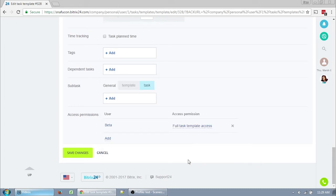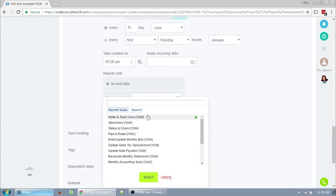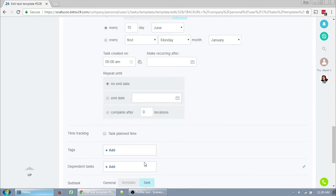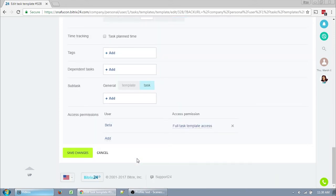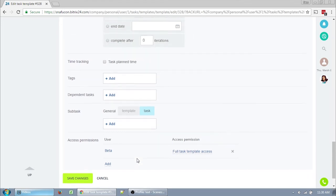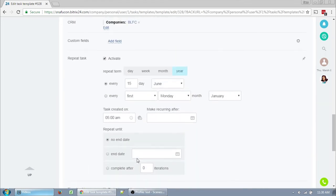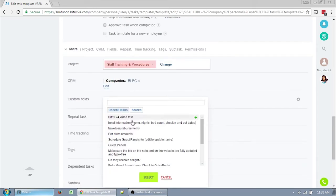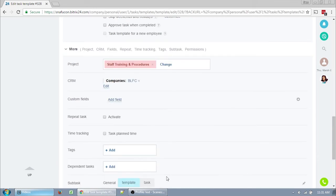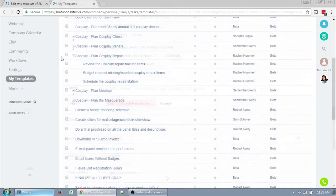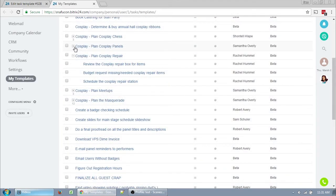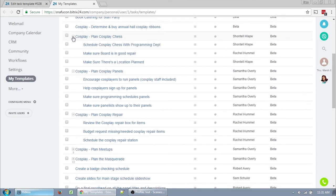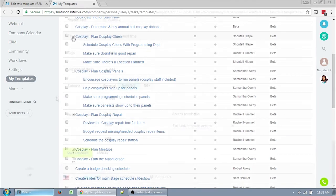Next we have subtask. Subtask is actually short for subtask of, which means this template is a subtask of another template or task. Notice that task is already highlighted, and I can't click on template. I strongly do not recommend setting a template as a subtask of another task. So if you want to use the subtask feature with a template, you're going to want to have it be a subtask of a template. The only way to do that is to not have it be a recurring task. If I go and I unclick activate next to repeat task, I can now select template, and now I have actual templates that I can make this a subtemplate of. The reason it can't be a subtemplate if it's recurring is because only the base template is recurring. So over here I have a bunch of templates that have subtemplates for cosplay. Each one of the base templates is set up as recurring, and each one of the subtemplates is not. So whenever the base template creates a task, all of those subtemplates are created at the same time.